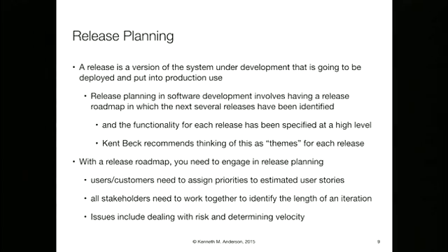This first theme is the, what's the minimum thing we have to support for this particular business use case. And then the next one's going to be the touch interface, or the mobile interface is going to be the next theme. The next theme is going to be having a strong web presence. Whatever it is, just to kind of help you orient and kind of do a bucket sort on all these requirements. You have requirements that touch on web stuff, and you know that the web stuff is going to be pushed off. The first focus is going to be a desktop app. Then you might be able to easily put those stories out a couple of releases.